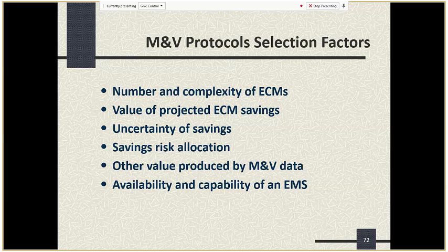But if you look at a really large data set, I was actually on a phone call earlier this morning with Lawrence Berkeley National Labs, where they looked at over 6,000 projects that they have in their database. And there, I think, because a lot of those are older projects where people were even more conservative in providing that safety margin, they came in around 85% of savings that were projected were typically guaranteed. Now, in more recent years, people have whittled that safety margin down a little bit, closer to the 5 to 10% instead of a 15% safety margin. Frankly, since they have more experience and better results, they are usually overachieving their guarantees anyway.